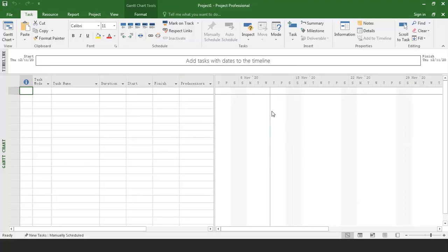Of course, normally we are not going to plan our project starting from the current date. We will plan the start date for the future. By default they assign the start date as the current date, so you need to change it. Based on your hands-on exercise, the contract project duration is from 15 November until 28 February 2021. So you need to change your project start date.